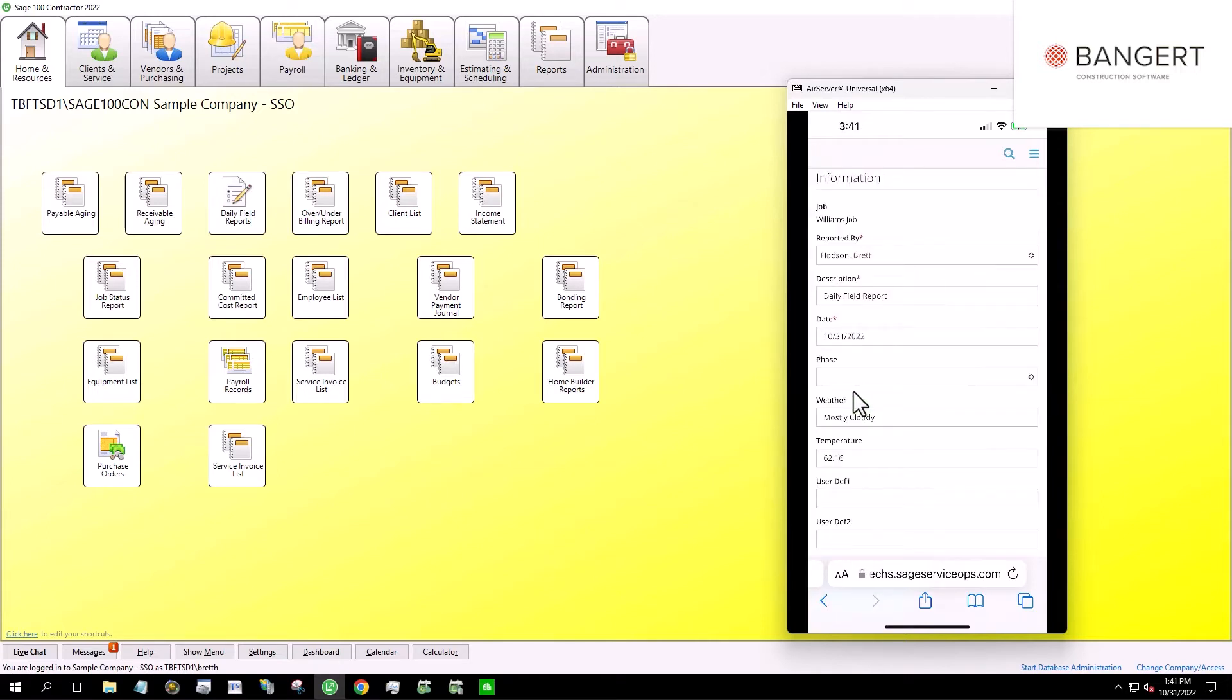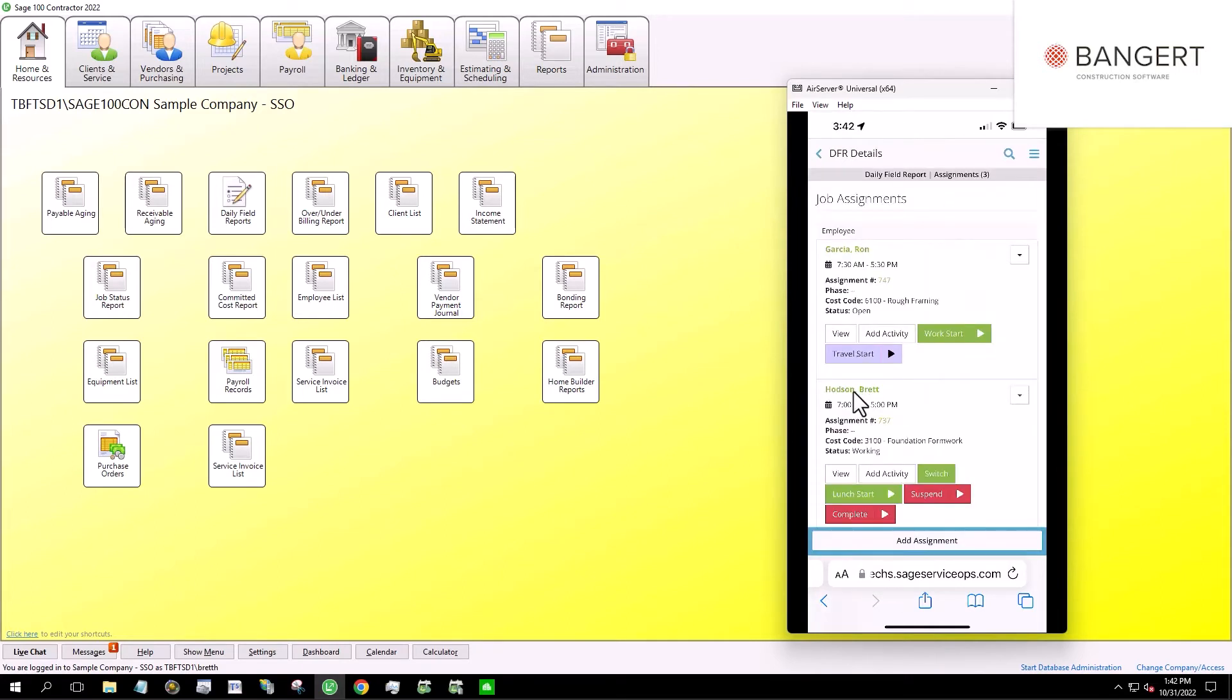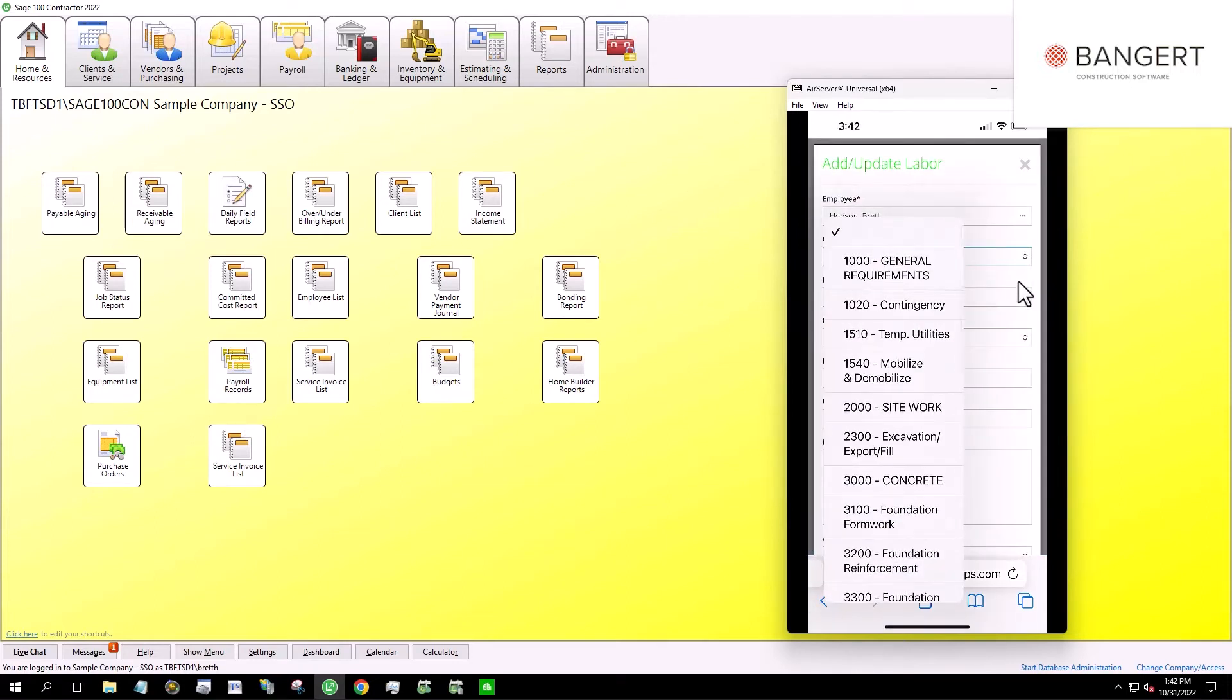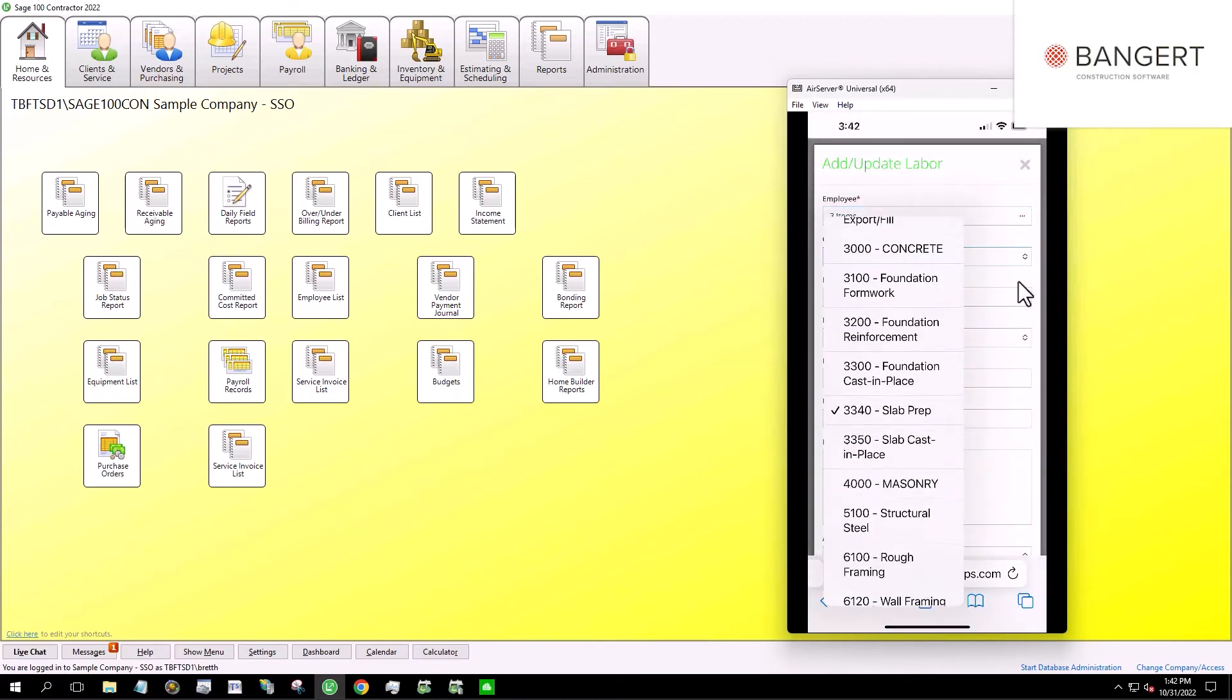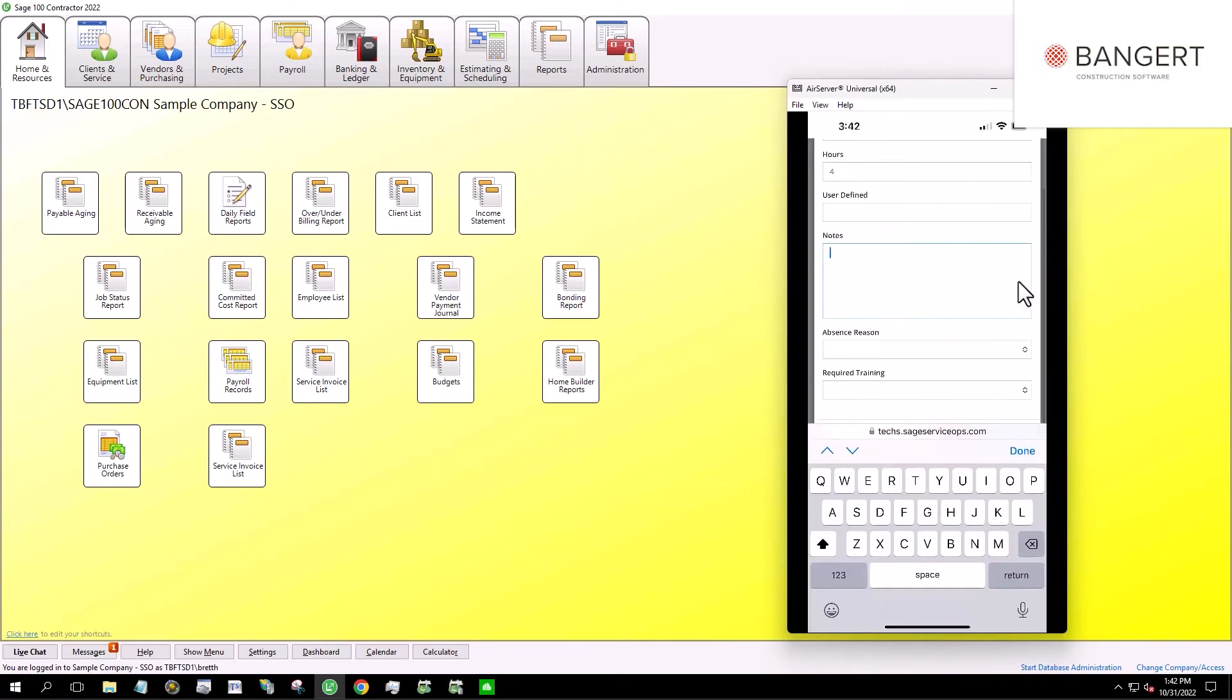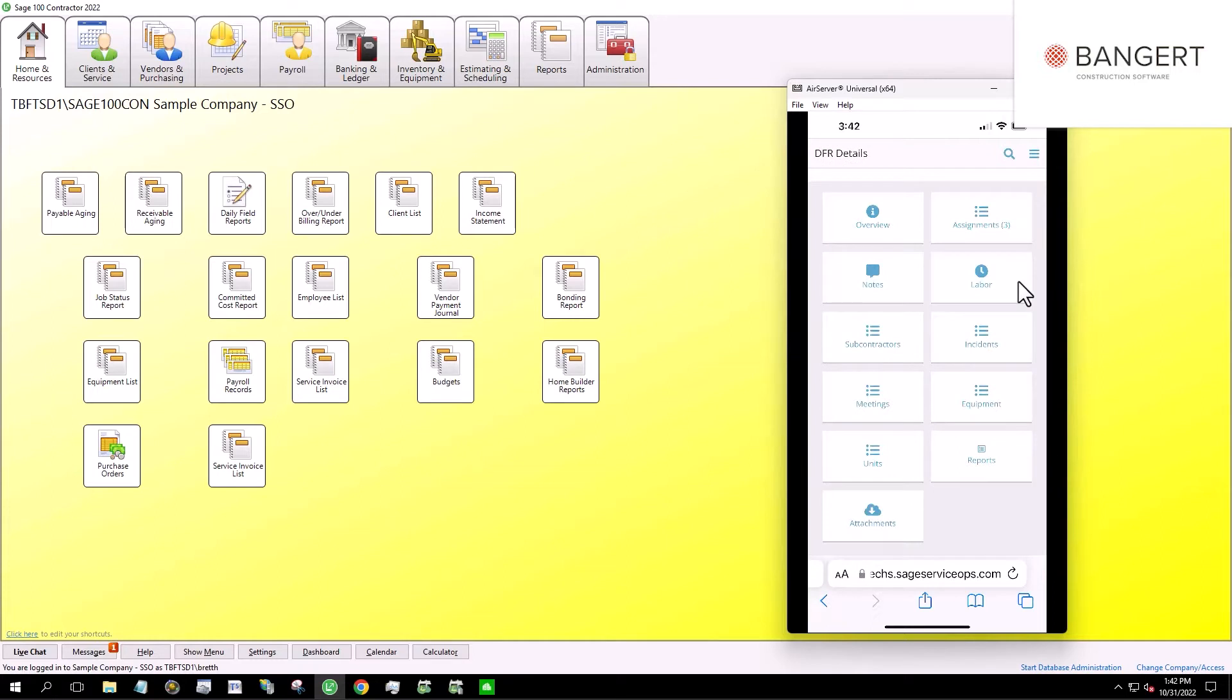And what you're going to see is the system will pull the current weather. So it's mostly cloudy, 62 degrees. While I pull this up, you can see again, my assignments. So I can do my clock in, clock out, as well as the second way that you can record labor is you can just simply type the labor in. So if I wanted to record labor by saying that we're doing slab prep today, it's regular time, and it's Brett, Chris Allen, and Ryan Adams, I can select all those individuals and say that we are out there working on that for four hours today. I could put some notes in. Easy work today. And I could save that.